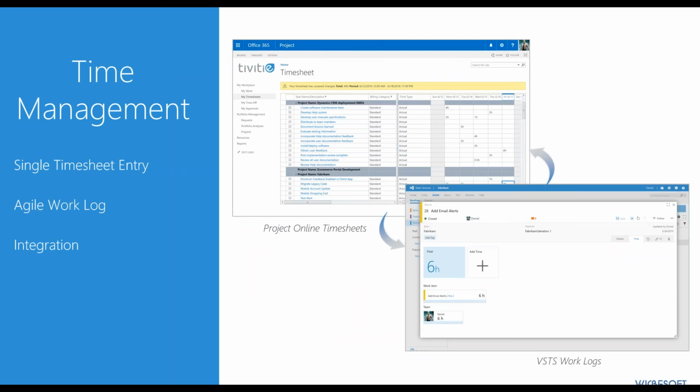And then on a time management perspective, instead of having to status your work in two different places, in this case using Visual Studio Team Services right in the work items that you're working on, be able to put actual work in progress in there and have it seamlessly feed back to a timesheet is a benefit. It eliminates the duplicate entry that I mentioned earlier on that often happens when we have silos and multiple systems that are doing duplicate things and overlapping things in many cases.